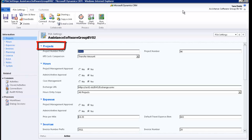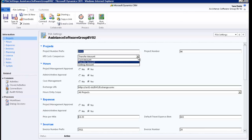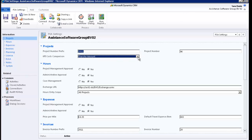In the first section of the screen, you will find the naming convention of your projects. The project number prefix is determined by you and can be alphanumeric. The project number will be generated automatically and its sequence will start by default at 1. The KPI costs comparison field will determine what costs will be used in the KPI chart of the project module, which is delivered out of the box by Assistance PSA.